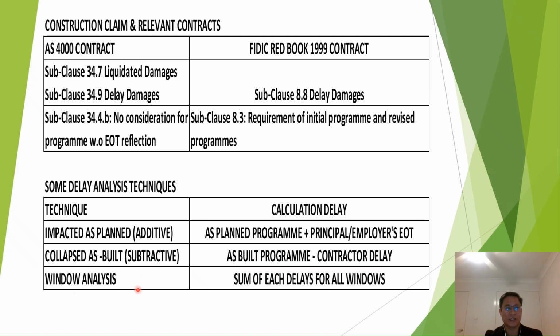And the last analysis I want to mention is window analysis. The theory of this technique is that the construction program will be divided into several specific periods. It can be monthly or quarterly, depending on our agreement in the contract. And the sum of each delay for all windows will be the total delay of our construction project.